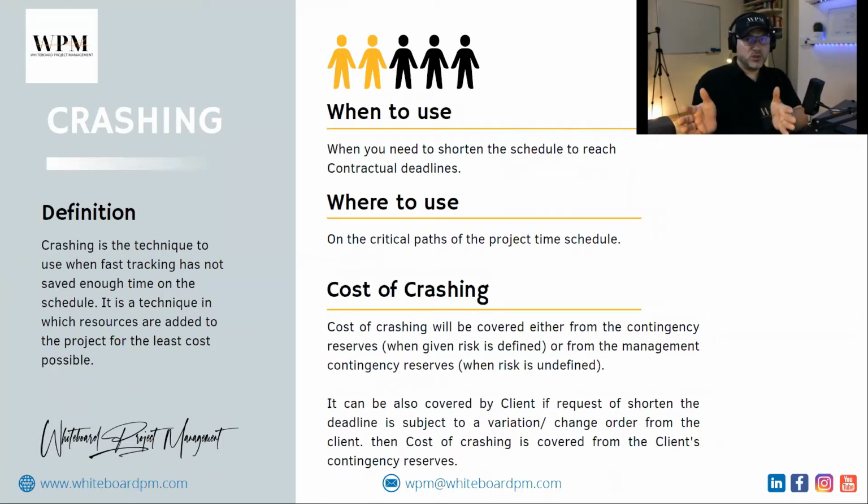So you want to reduce your project time for a reason. Either you are not going to fulfill your deadline and you need to decrease it, which means the risk is on your side as a contractor, or for a reason like market requirements, as a customer you need to reduce your deadline. That means you send a change request, or a change order, to the contractor, or it could be another factor.